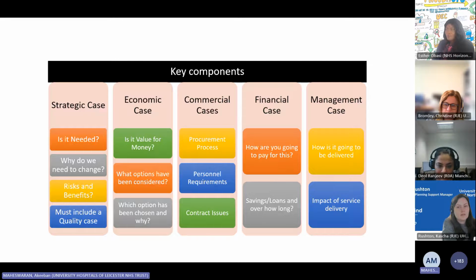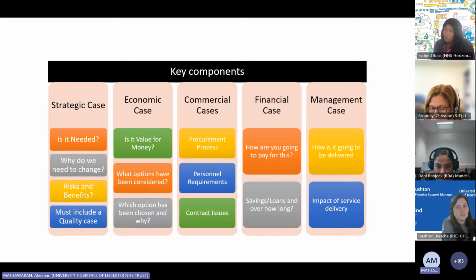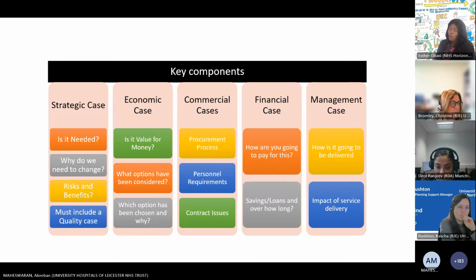If it's an emergency kit, or some kit that you don't want to use and it's only there as a backup, you might be better off paying a smaller upfront cost and then having a higher consumable cost, because actually over the lifespan of the equipment you might not use it as much, and that might work out cheaper. So look at the whole life cost.